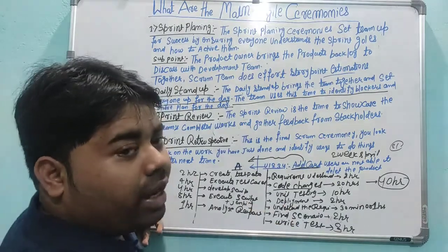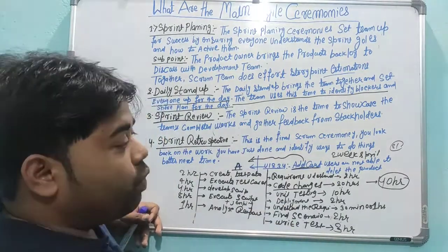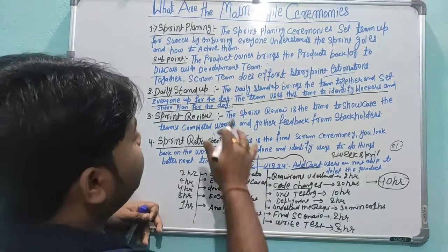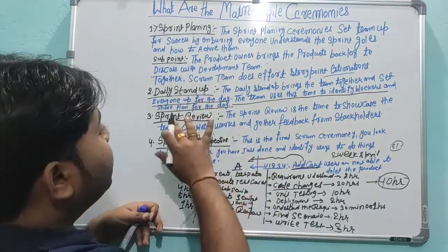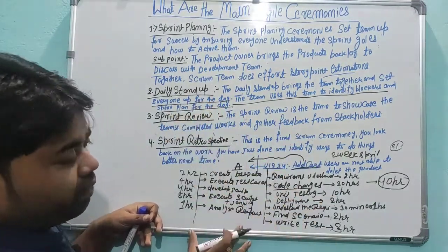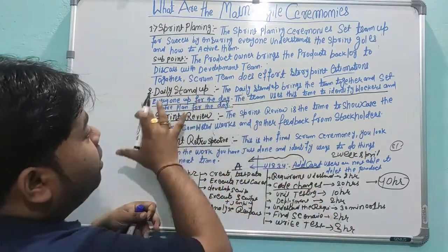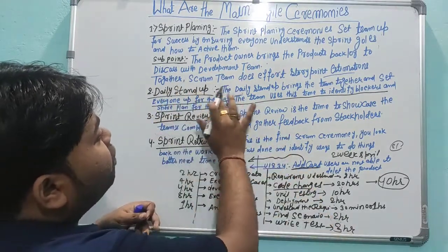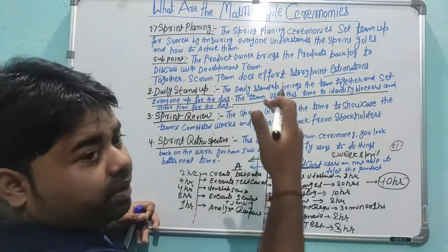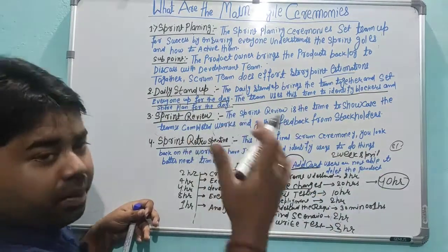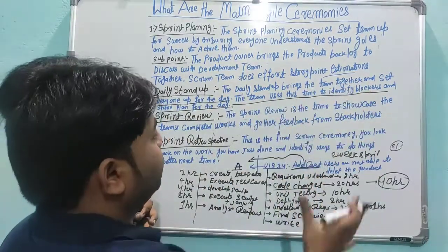And you also have to tell what you did yesterday and what you are going to do today. So this is what we are going to discuss in the daily stand-up in this duration. We are going to give the proper status, and any blockers that are there, we are going to discuss.